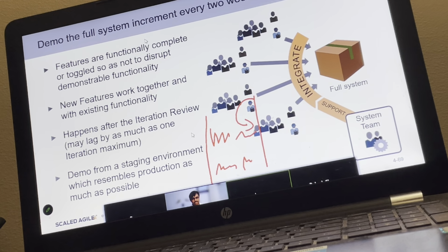Okay. What I see here is that we are planning capacity and loading. We're doing the loading based on the capacity, however we are not planning for some rework. If you have a history of doing rework, plan for it. Don't load your teams fully. So then it's up to us.